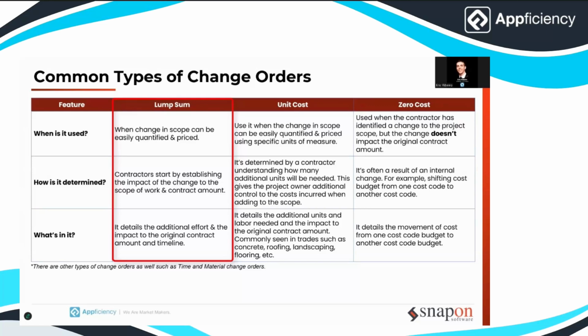And it's not always about the money, right? If that change order is going to delay the project schedule, maybe you're adding work that pushes the job back by 2 weeks, that needs to be stated clearly. So you'll want to include revised dates in the change order so that the expectations are clear and contractually updated.